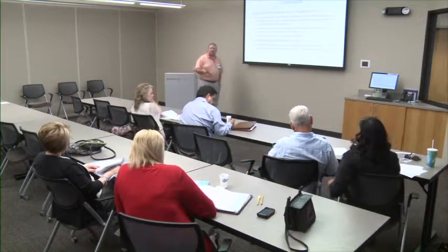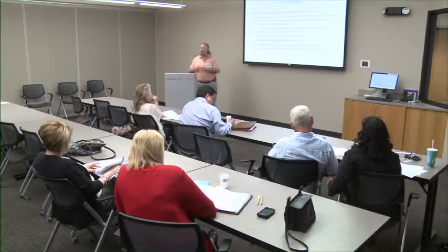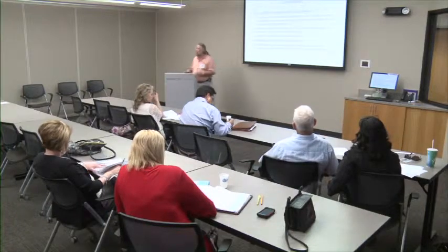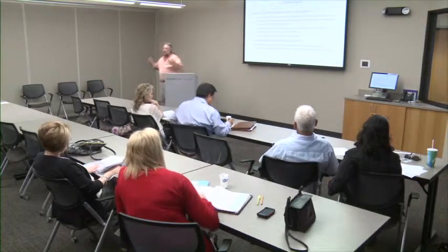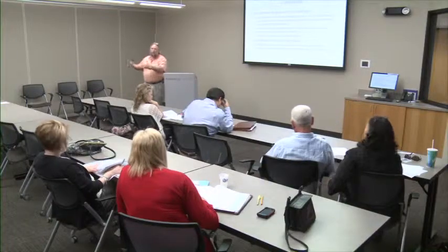Are the relationships complete? Do we have everything that we needed to go into it? If we're talking again about painting the room, in our activity assignment, paint the room is the last thing. Did we put in the fact that we need to tape the walls? We need to put down coverings to protect the carpet. All the other things that need to go with it, did we get all the things before we can actually start it in place?